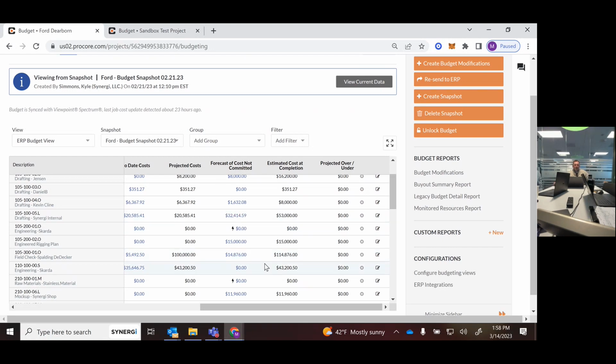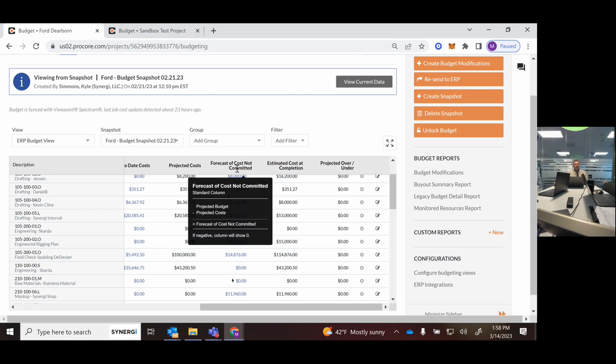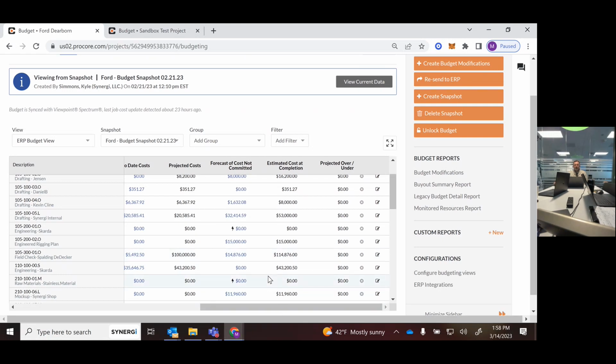So whoever you're working with, you'll go through this a couple of times. In that PCS meeting, we basically go through and review these forecasts to collectively ask, is there anything that you're forgetting about that you're not forecasting? Or, I see you forecasted $100,000 for this, but we're also probably going to submit a change order request for that $100,000. So don't forecast it as a cost because we're going to be reimbursed for it. Those are the kind of questions that come out of those meetings.